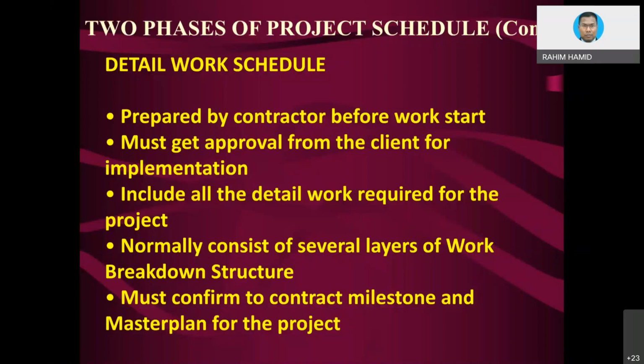Let's say the master plan is basically the thing that you put in 2 years that consists of the major activities within the time frame of 2 years. But then detailed work, you must split into month or even week or even daily basis so that people can see. If you want to hand the schedule to the workers, it is better to divide it into daily work so that they can absorb. If you give them too much, then that's it, they are not interested. Okay.